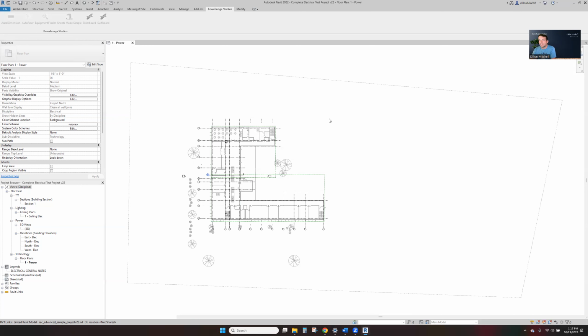And then anytime anything gets updated, we'll again export everything out of Revit or update those values in the Excel sheet, copy out the one column, put in the new one, and then we'll be able to effectively showcase and update our pricing accordingly, for standard items. Lighting, you're still going to need to get your lighting rep involved.